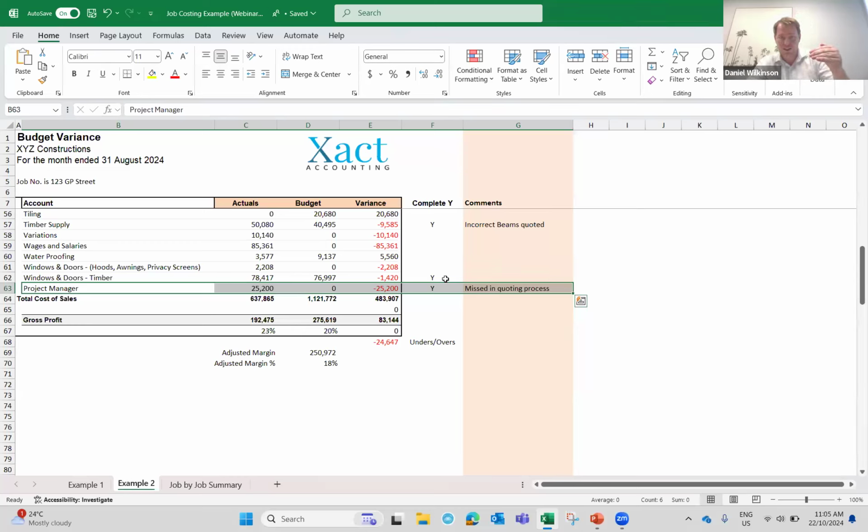We capture it. Costs are coming in. Well, hang on, your time's valuable. You've got a supervisor on site that's a bit green. You're going out there once a week. Why aren't we capturing that? So that's our feedback loop. Now, guess what? There's a project manager fee in that estimate going forwards. So apologies that this is a bit of the lighter version of it, but the philosophy is exactly the same. Whether it's a big business, small business, big tech stack, no tech stack, it's exactly the same. Micro-measurement is absolutely critical.